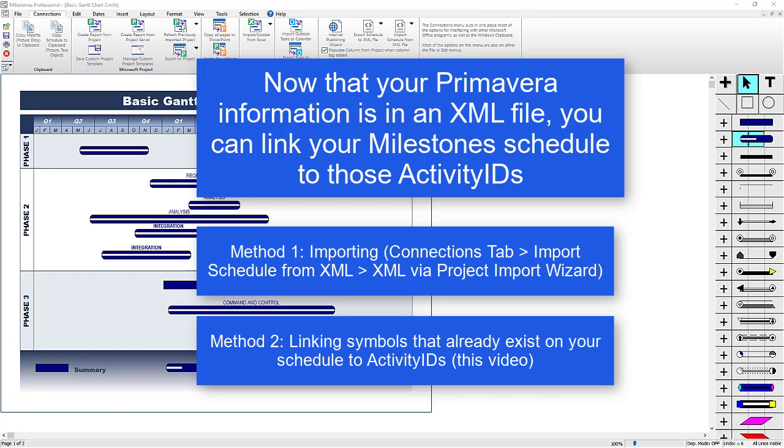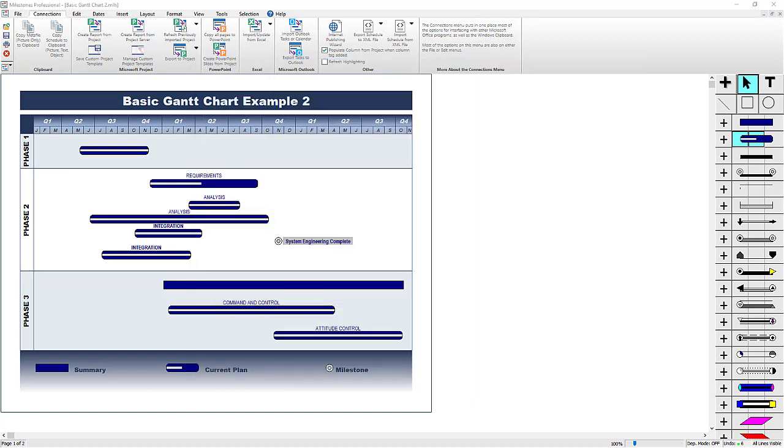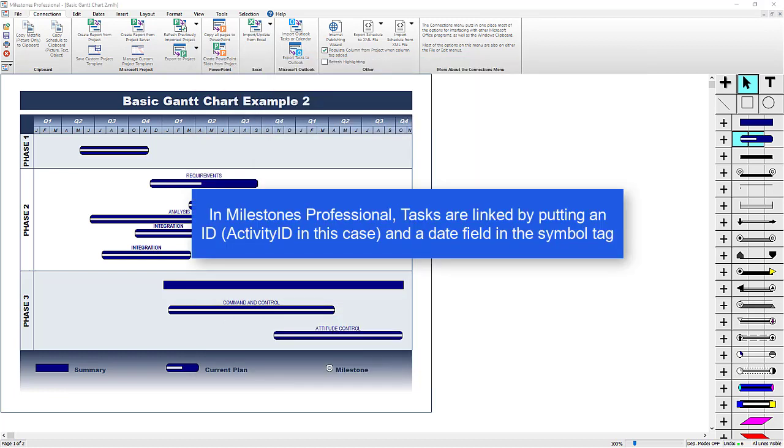In Milestones Professional, tasks are linked by putting an ID in the Start and Finish symbols of those tasks. Each symbol will need an ID and also what type of date field that symbol represents.